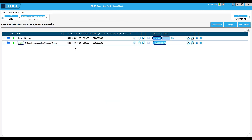Currently the only report available for change orders is the recap report. All other reports — consolidated, stocking, etc. — include the entire project plus any accepted change orders. This is our first release for change orders; as we get more customer feedback we intend to continue making improvements to this and other areas of the program. That covers it — back to you Amanda.